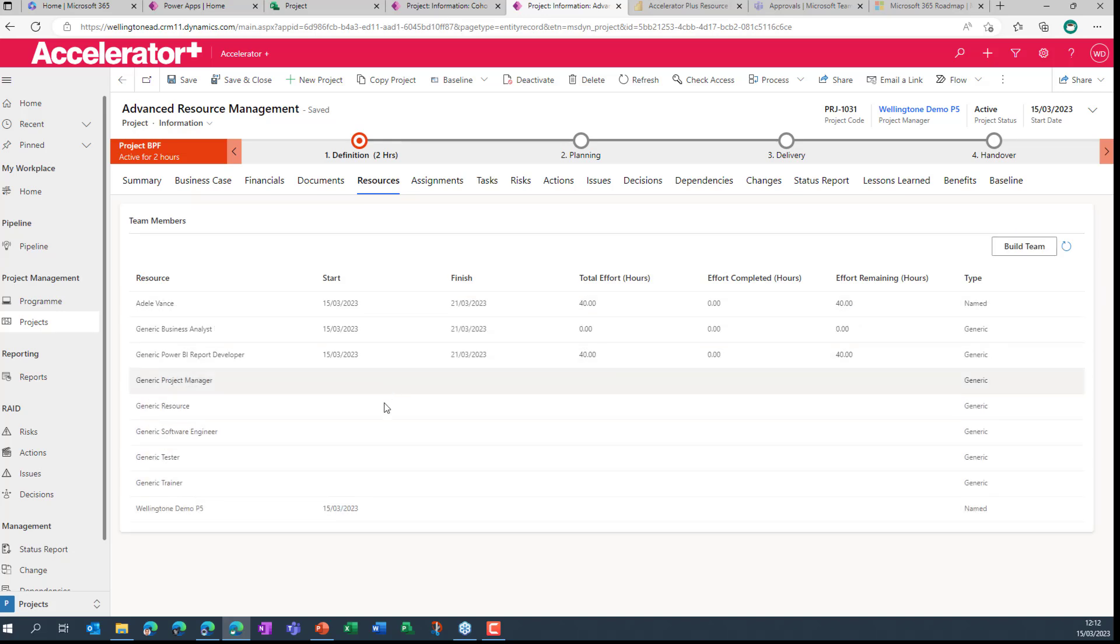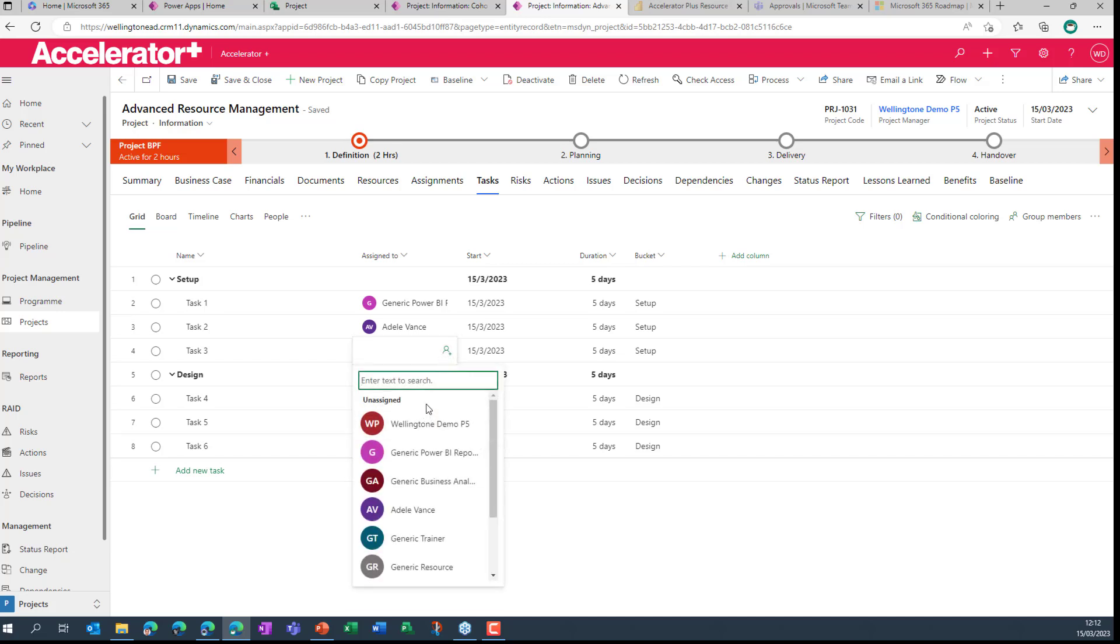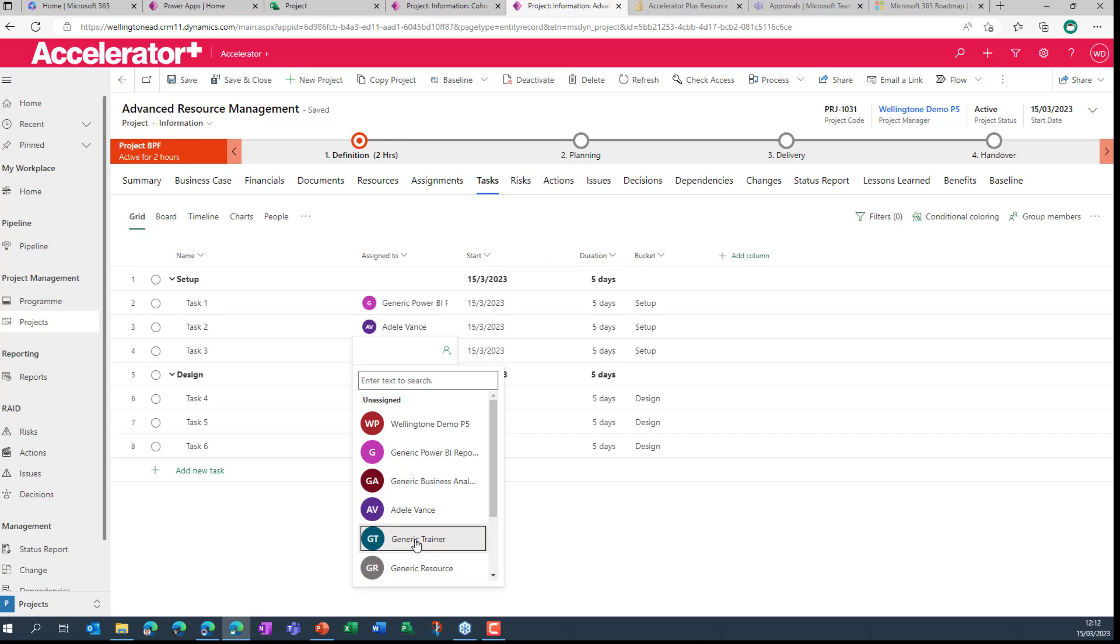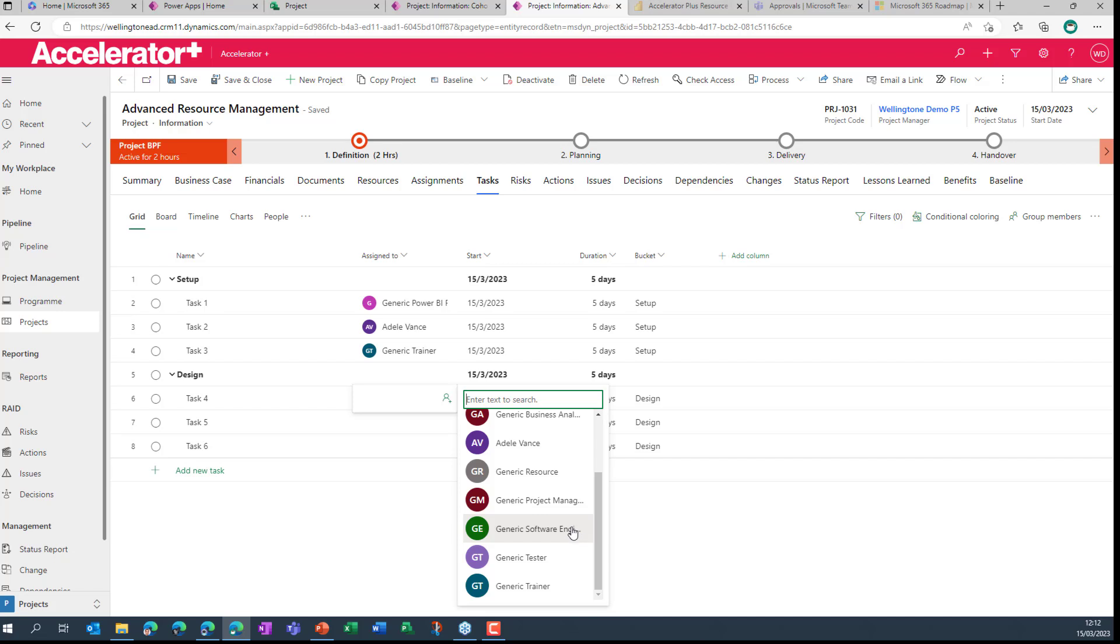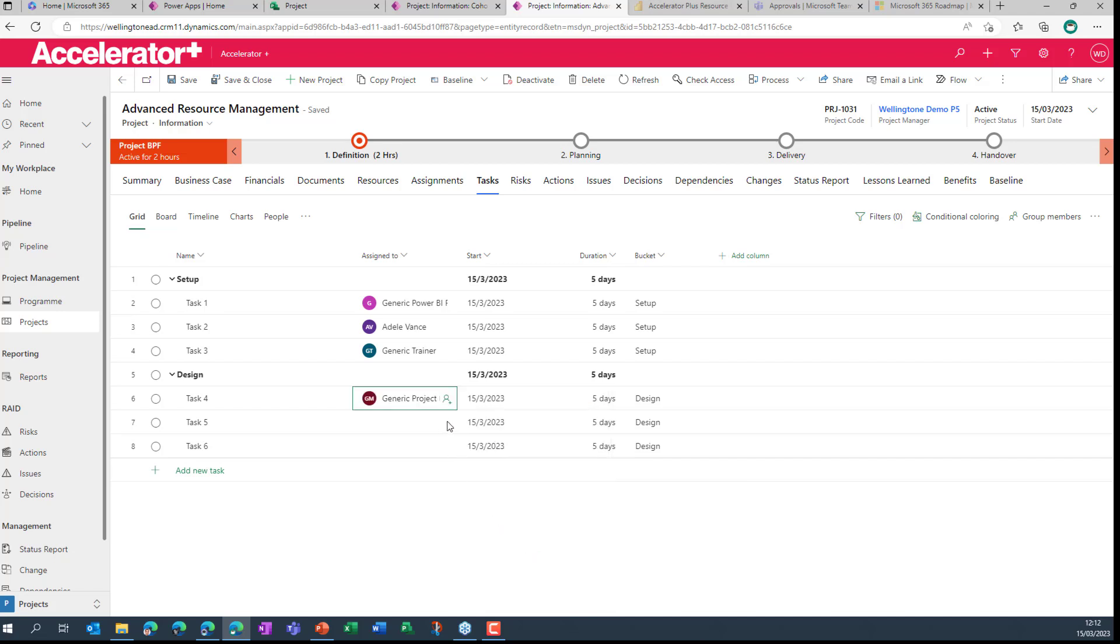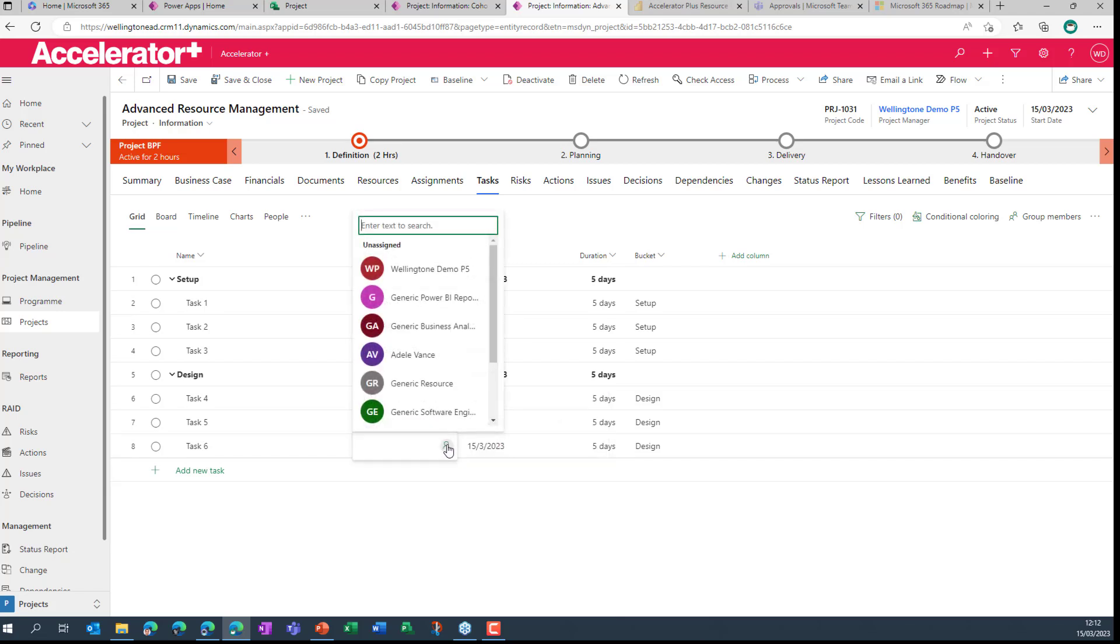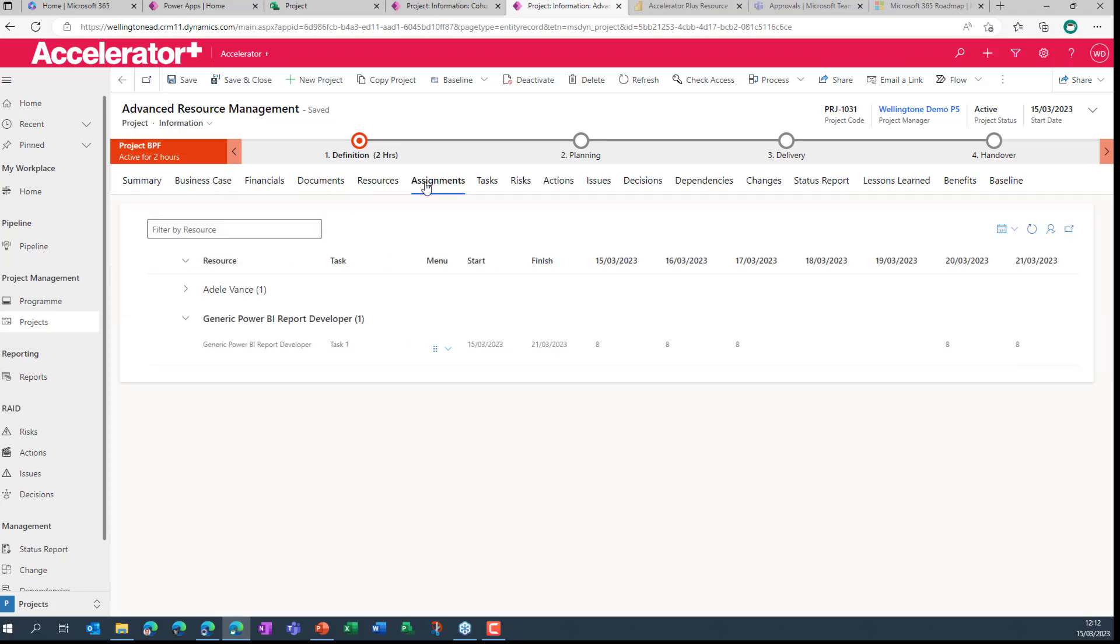And this will update. So here is now our team that we've built for this specific project. If I go back to the tasks view, what I can now start to do is go in and start assigning work to individuals. And you'll notice that rather than me typing in the name of a resource, as I might have done historically, I can now see a list of all the team members that we've added so far. So I will go through adding a few generic resources. And by the way, against an individual task, you can add more than one resource. As you can see here, I'm going to add in a tester. Let's add in one more. Let's make it a software engineer.